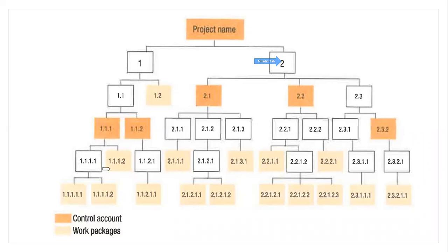So I will say that for this particular fuselage creation, I have to spend X amount of dollars. You internally give a budget to that, and then you manage it through the control account, so that for each of the verticals, let's say the IT piece or the electronics piece or any of the XYZ components or verticals which you create, each of the stencils which you have on the work front, those have to be monitored in the back end: what is spent on each of these, what were the milestones for each, and are they meeting them or not.